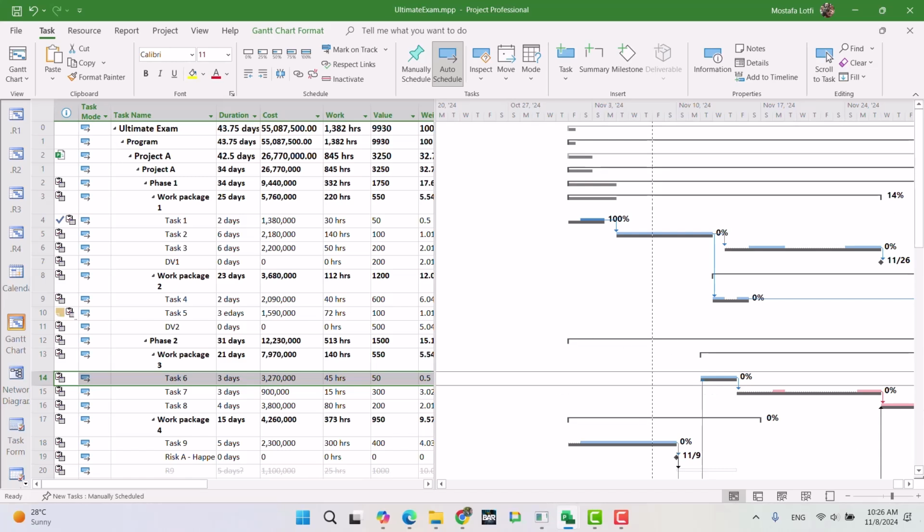So when you open the project file, if you see a task, for example here, that is 100%, this task is completed. Maybe yes, this task is really completed. I'm not saying it's wrong, but the task did not complete in the future. The task happened in the past. So you need to know when exactly it started and when exactly it finished.